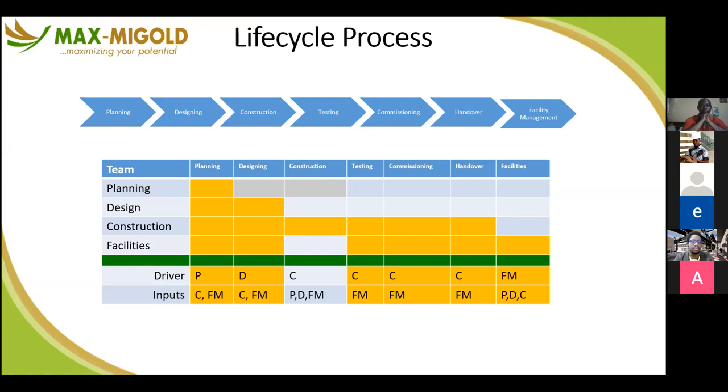What happens at testing? At testing, we are using a template similar to the one you use in your lab test to check for the functionality of various operating parameters of the assets. If it works, it is fine. That's what testing does. So if the operating parameter is, oh, this thing is 1.97 kilowatts, and then it's 20 amps, and then it's this, and then that, when it's running, I want to see that those parameters are established. Then you have done your job.